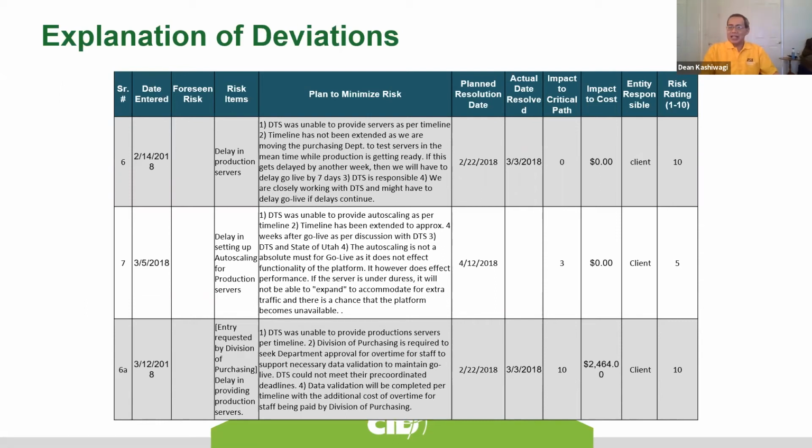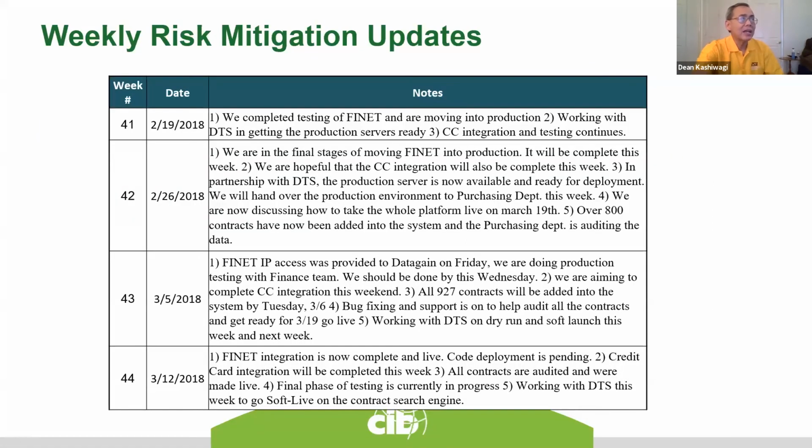Amazing. It's so simplistic. And you can't read all that, I'm sorry, we don't have time. And then every week, the vendor now says, I'm worried about this risk. We're not there yet, but I don't see it happening. And I highly encourage you to get on this. So when the risk occurs, it's not a surprise. And there's never a discussion of whose fault it was. The major emphasis is on risk mitigation.